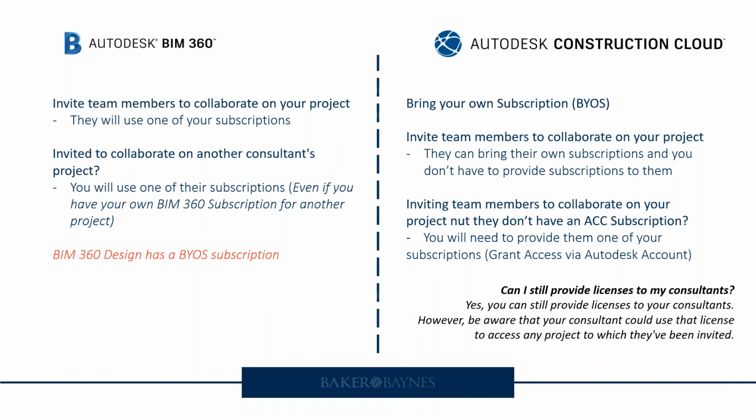A lot of the times people like providing licenses to their consultants because it has a bit of sense of control and that you know that the project will be managed in a specific way on a common data environment. The answer is yes. If you want to still provide licenses to your consultants, specifically from an owner or from a client point of view, you can go do that. However, the license that you provide them, they can use on other projects. Whereas in the past, if you provide them a license, they could not use that on other projects.